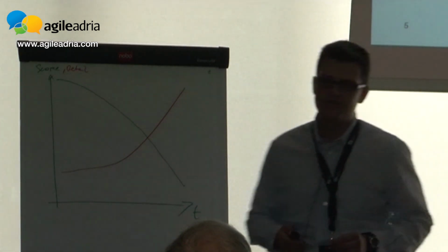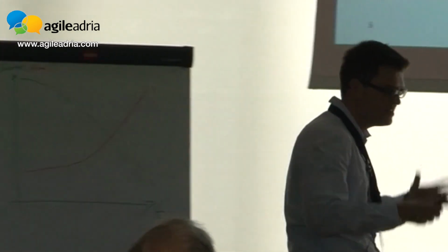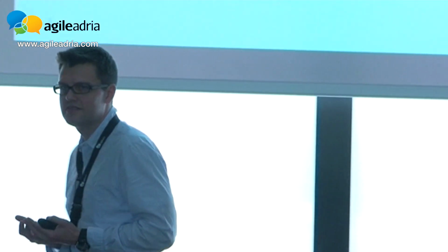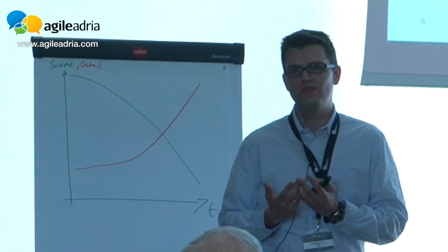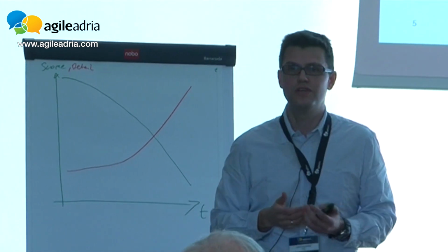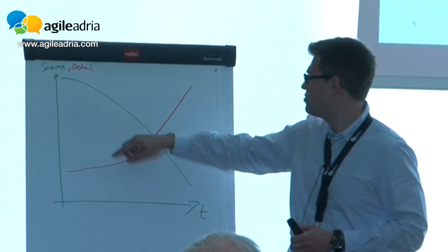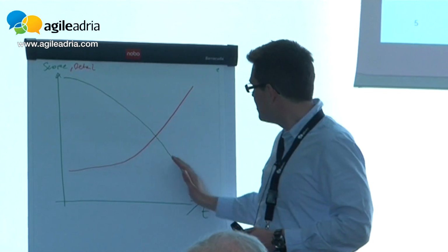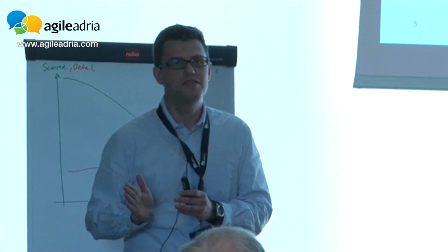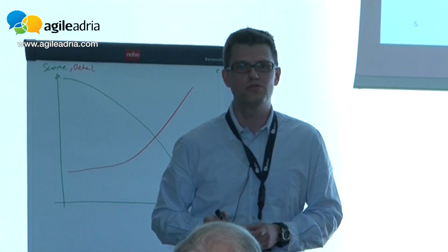So if I look at user stories, yes, they are there to describe what features you need. Yes, you can use them to plan. But I think that's not what makes user stories the important thing in Agile software development. What makes user stories important is that you are aware that the user story is just an option. What you would like to implement, but probably you won't. Something you think might be helpful. And since you're refining it over time, and since you are adding detail only after some time, it's much easier to decide whether you want to have this option or not.